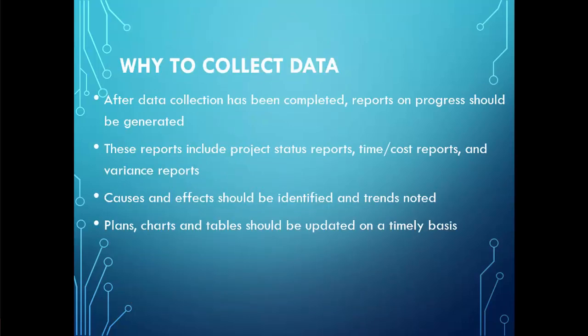Collected and analyzed data will help in generating project progress reports that will include project status. When we say project status, that's really saying where do we stand today relative to the target, and it shows actual versus planned by areas of interest, which are the goals that we stated at the beginning of the project.